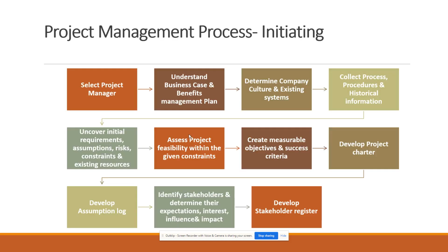So that's all. These are the various processes that we will do in the initiating phase. Let's recollect once again the overall project management process in the initiating phase. First, we select the project manager. He will understand the business case and the benefit management plan. Once he understands, he will study the EEF, enterprise environmental factors. These are the factors affecting the project that are not under the control of the project team, like company culture. There are two kinds, within the organization and outside the organization. Those things he needs to study.